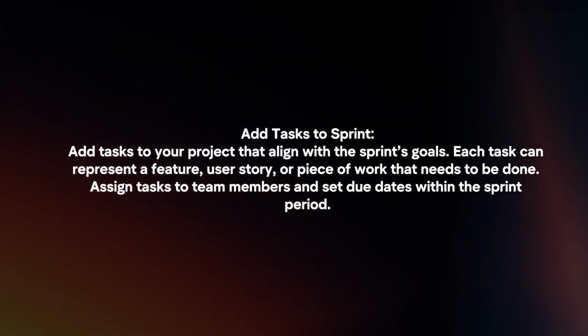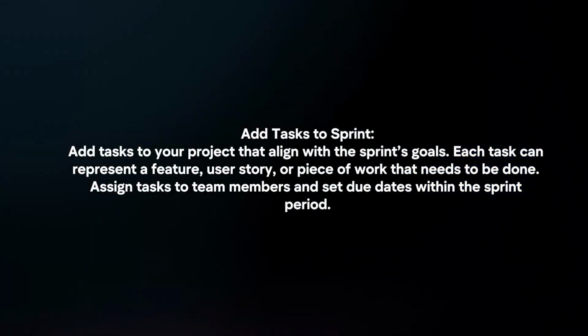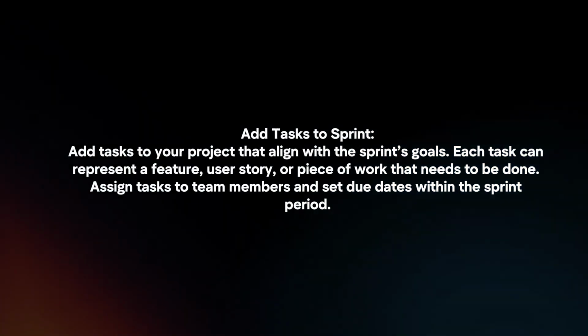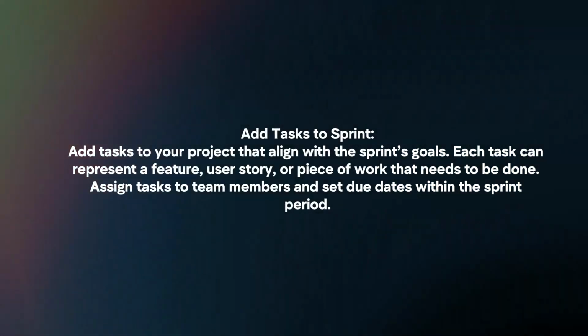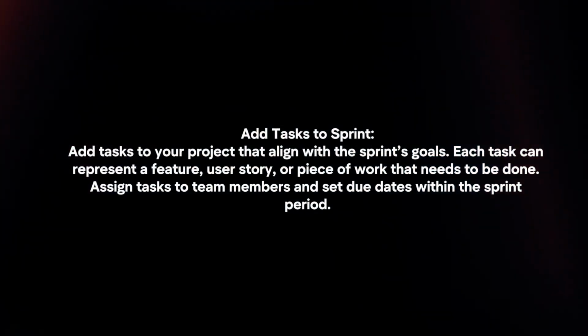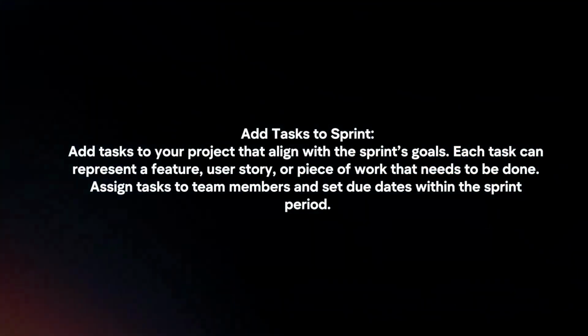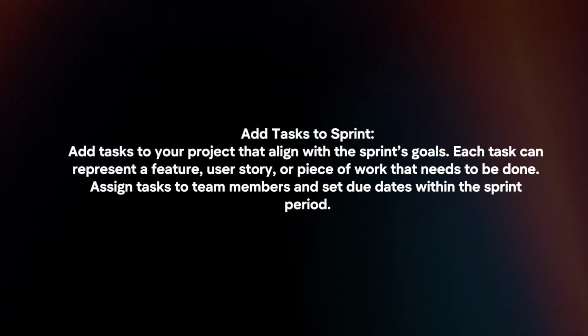Add tasks to sprint. Add tasks to your project that align with the sprint's goals. Each task can represent a feature, user story, or piece of work that needs to be done. Assign tasks to team members and set due dates within the sprint period.